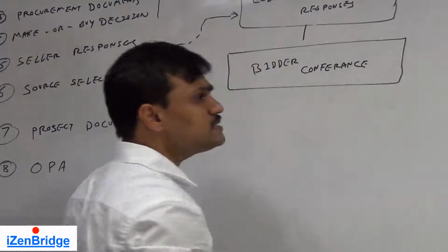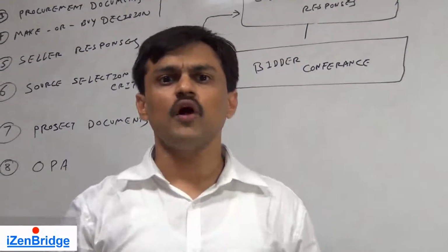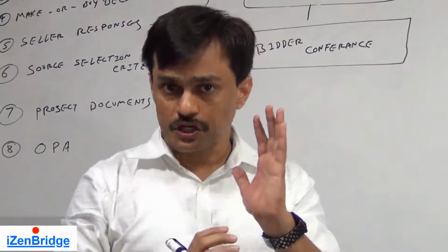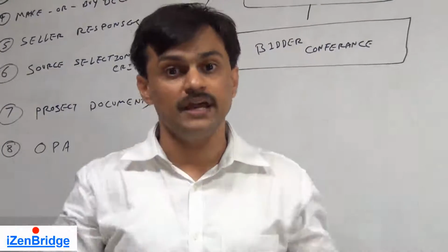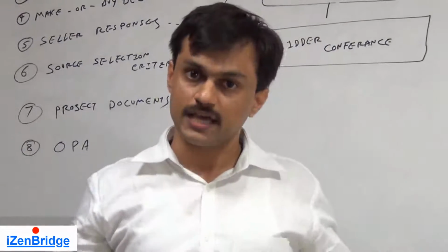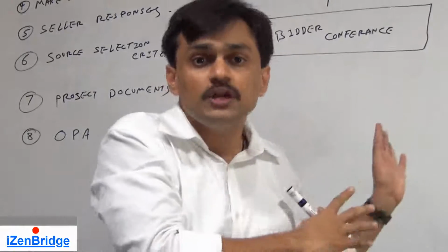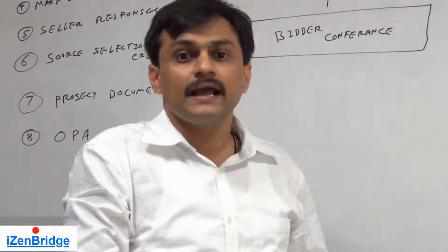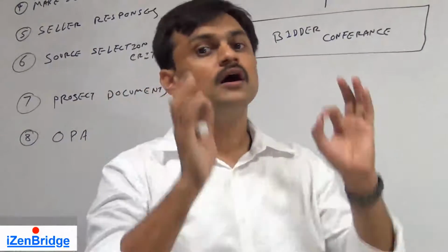Now a bidder conference is a type of conference where we invite all the sellers, and the clarifications sought by individual sellers are explained in front of other sellers as well. So this ensures that everybody who is responding to our tender or our request for proposal gets the same perspective of our requirement.